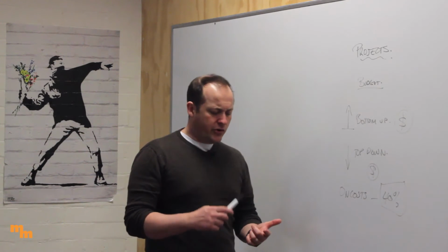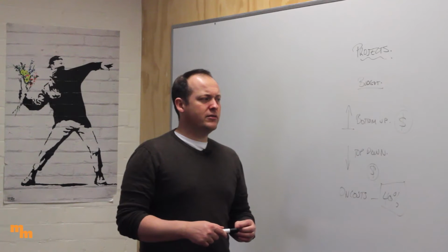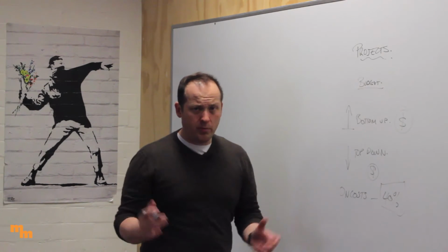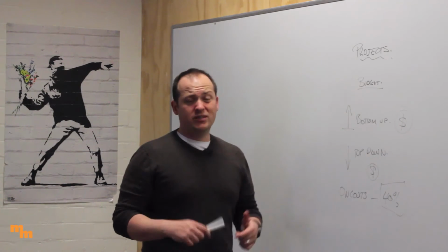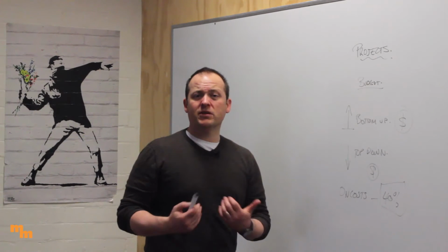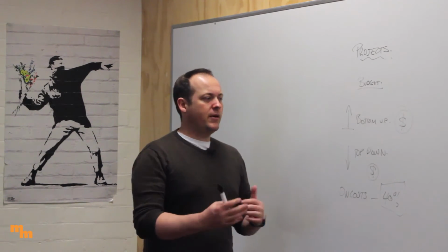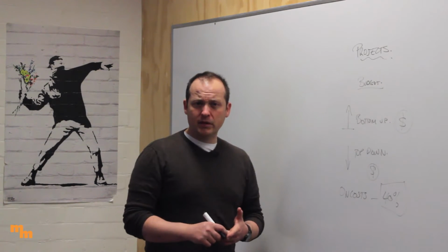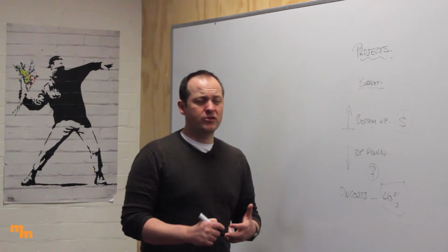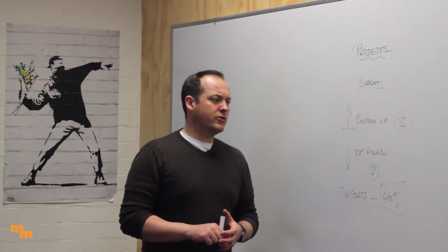Other things to think about for costs are things like your insurance and your risk costs. Okay, so you need to think about, well, what do I need to insure? If you've just gone out and bought a whole bunch of plant, equipment and machinery, you need to insure that to protect it. So if anything happens to it, you can get a replacement. The problem is obviously that then costs money to do. So I need to think about what insurances I need. Things like public liability insurance. If I'm buying a vehicle, it might be comprehensive motor insurance as well as third-party protection. Okay, because there's a whole bunch of different things there that I need to think about.